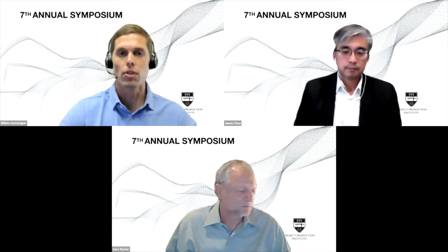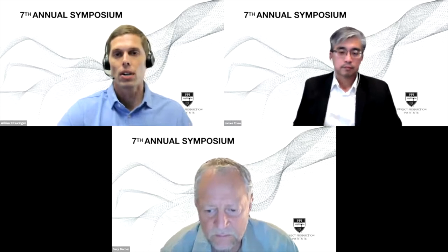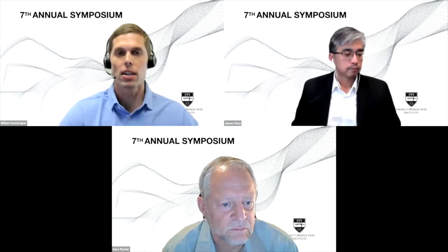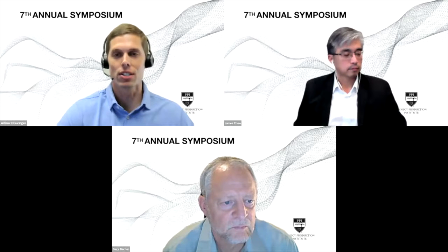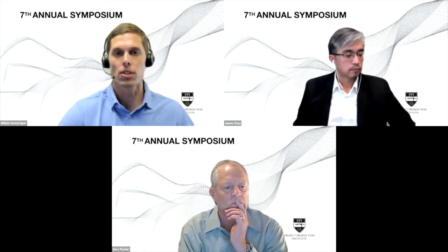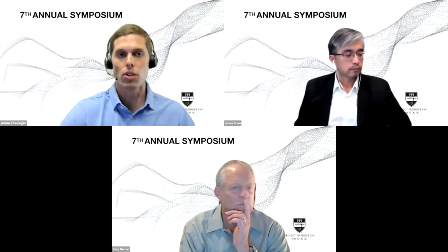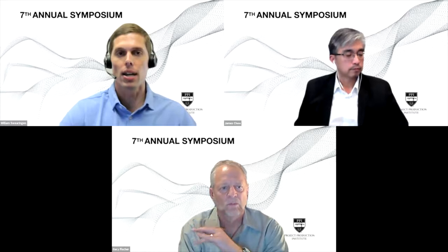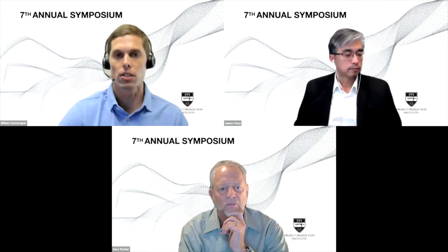I think it's one of those things in the construction engineering industry where, a lot of times it's, why do I have to get it 100% before we test it? And we're changing that model by saying, give me the 8 different versions of what you want to do, and we'll test all of them, and then we'll provide the options and the feedback. So we call them one-way doors. We don't walk through a one-way door and put ourselves in a bad spot and then have to live with it over the course of the 14-month production cycle.